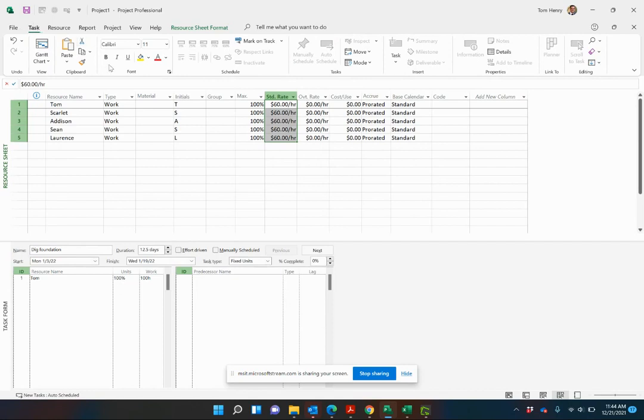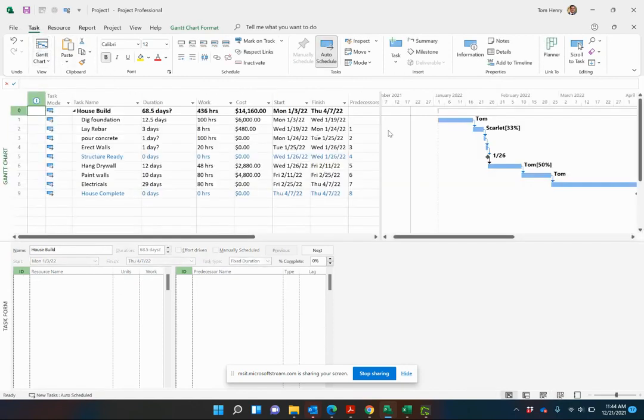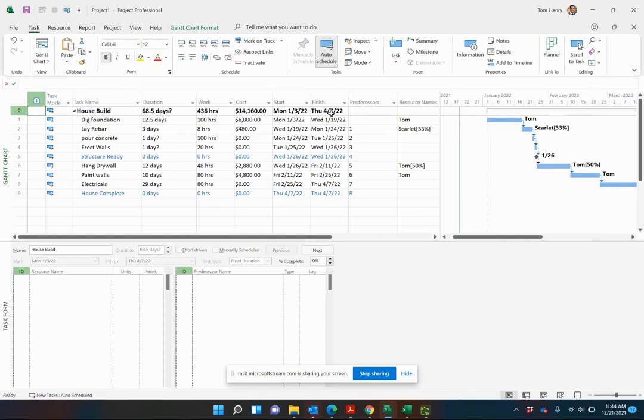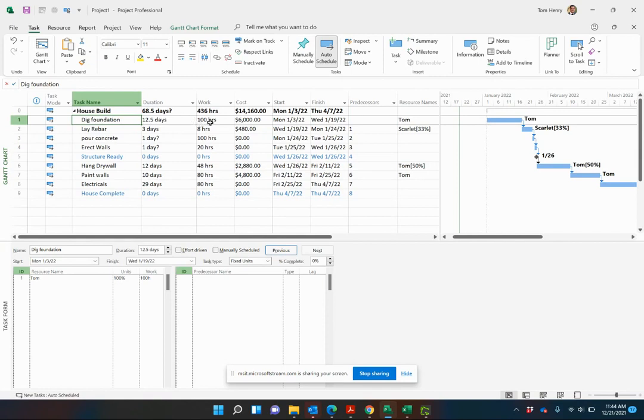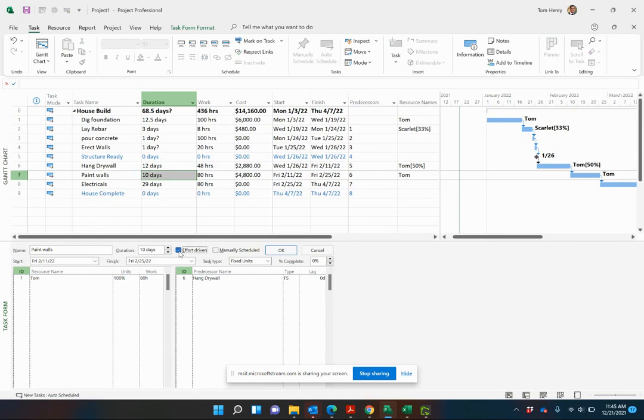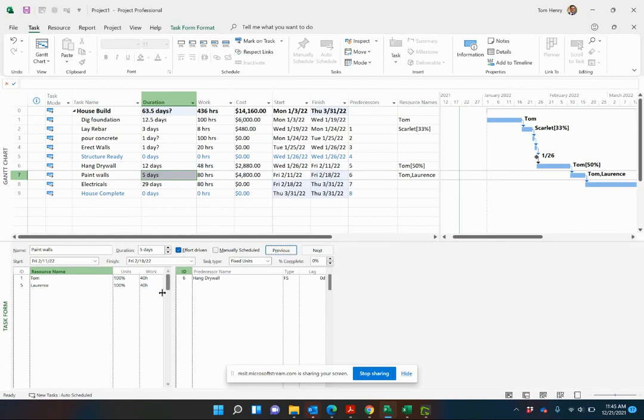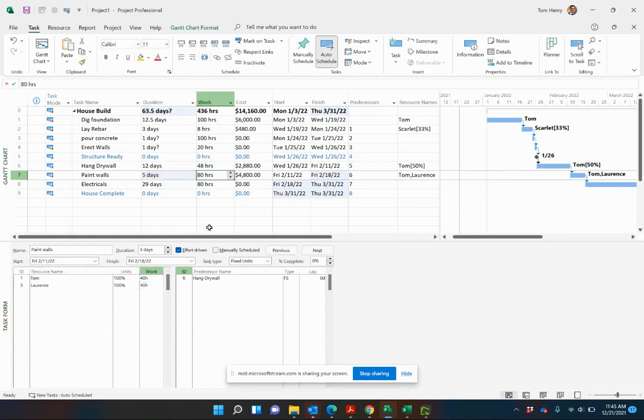Not only that, as you add additional resources, we go back to the Gantt chart view, you will see that the work can be split appropriately. If I have 100 hours, let's take another example. 10 days, 80 hours. If I make this an effort-driven task and assign a second resource, the work will be split across both resources. Effort-driven essentially blocks the work for that task. It says this task is 80 hours, I don't care how many people you throw at it, it's going to be 80 hours of actual work. The duration can vary, but it's an effort-driven task. Because I had that first calculation of effort, I locked it, as I add and take away resources, it's going to really help me to keep that number of hours constant.